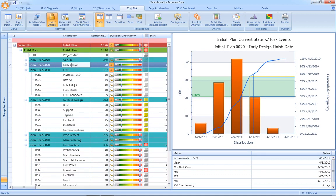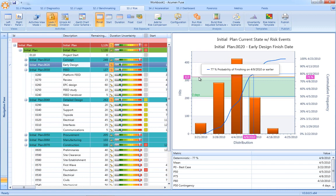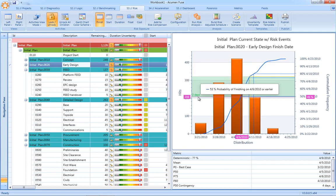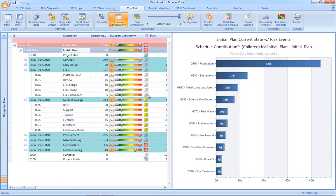Acumen Risk not only reports where we need to apply contingency to our schedule, it also reports where we actually have too much duration built into the underlying schedule. The tornado chart is used to report both risk hotspots and key risk drivers within our schedule.